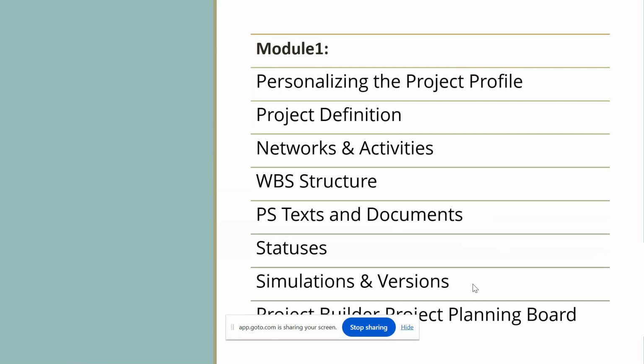See what happens in the project, what we want to understand. In case the project gets delayed by 10 days, what happens? If a particular activity gets delayed, let's understand. When we want to construct a house, what is the basic step? We'll first be creating the foundation. Or first, before that also, we'll get all the clearances ready. Then we clear the ground. Then third is creating the foundation. Before that, we'll have the design and everything ready. That is another part. So every activity is linked to the previous activity, right?